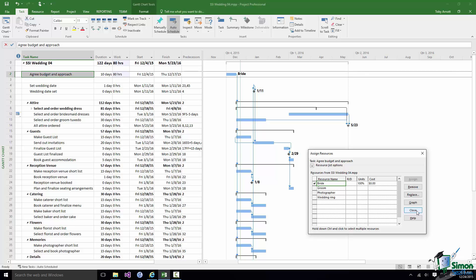That doesn't mean it's a 40 hour week or an 8 hour day or anything else. It just means that all of the time she's got available she is going to spend on that task while that task is in progress. Fortunately while that task is in progress she doesn't actually have any other tasks on the wedding so she can spend all of her time on it.